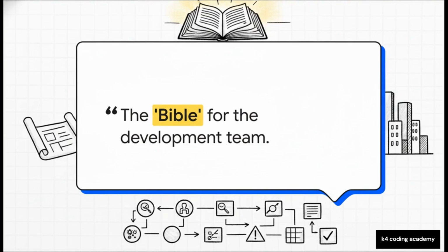Once the project gets the green light, we're on to stage 2, defining. The goal here is to get incredibly specific. What exactly should this software do? Every feature, every function, every little constraint gets documented in a super important file called the Software Requirement Specification, or SRS.